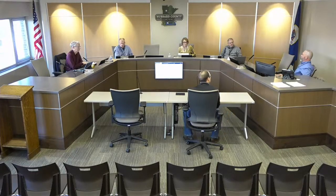Yeah, and hopefully plan review gets done early. We might even be in a little bit earlier than that, but that March 17th was an estimate based on the state's turnaround time for the plan review. So those could increment up or back depending on the state's responsiveness.